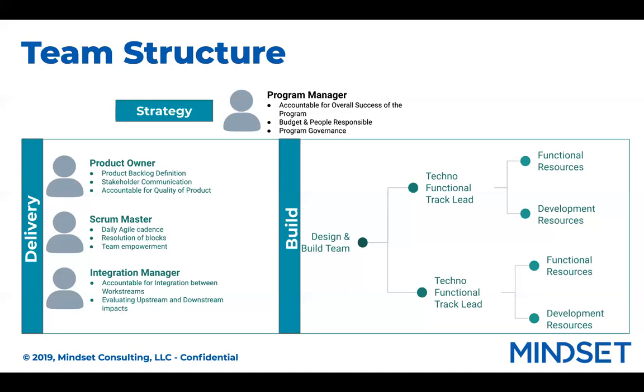So this is the team structure that we have leveraged in this project, and it has been very helpful for us to scale as well. A quick example on that: when there were more user stories, more requests coming from the business community, we were able to quickly assign and prioritize based on the tracks. And once one track was finished, we were able to take that capacity and divert it to the other track. So that provides a lot of synergy and ability to scale for us.